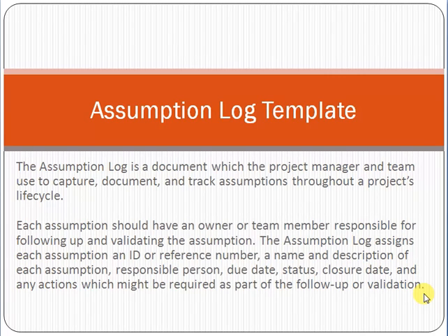We have to put all the assumptions in a document, and we must verify them, follow up on them, and assign these assumptions to some person. And also if any action is required associated with those assumptions, then we have to take that action as well. We must maintain the status of these assumptions as well.